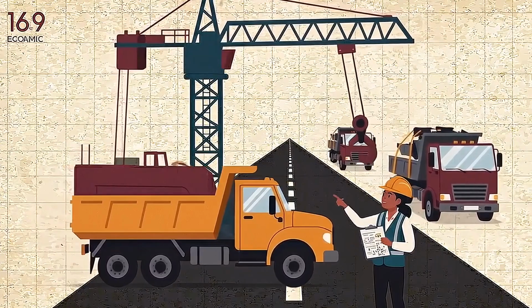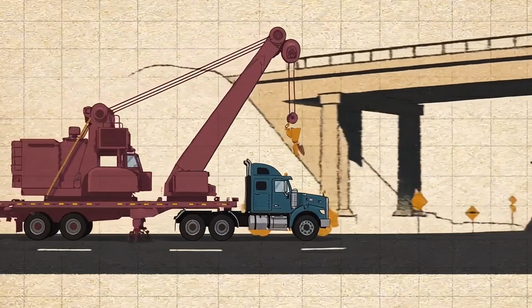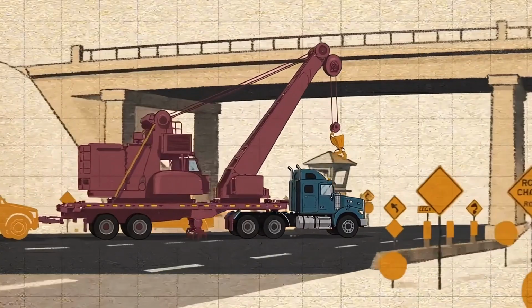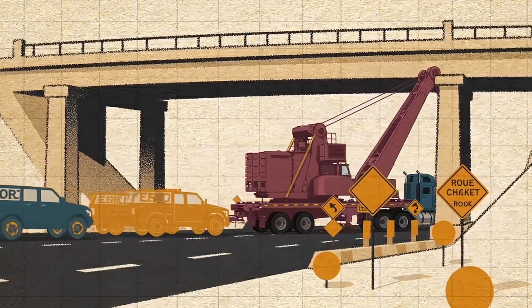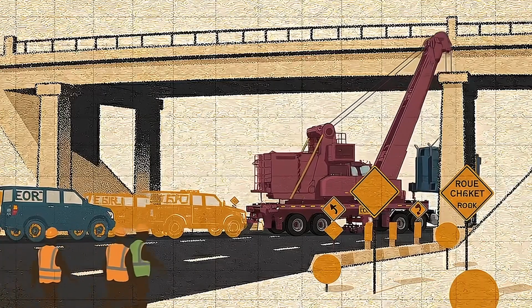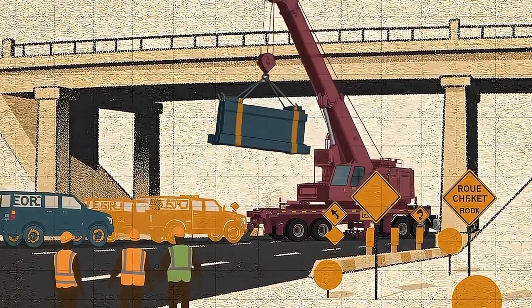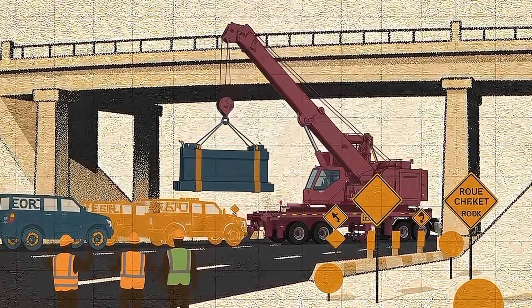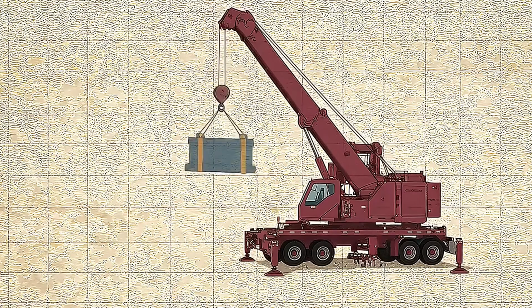But the Indianapolis job was not simply a matter of bringing the largest crane available and lifting 18 pieces of concrete. According to ALL, the company behind the lift, the crane was selected because the job combined 2 requirements. It needed enough capacity at a roughly 120-foot pick radius, and it needed to move between work positions quickly enough to fit the project sequence.